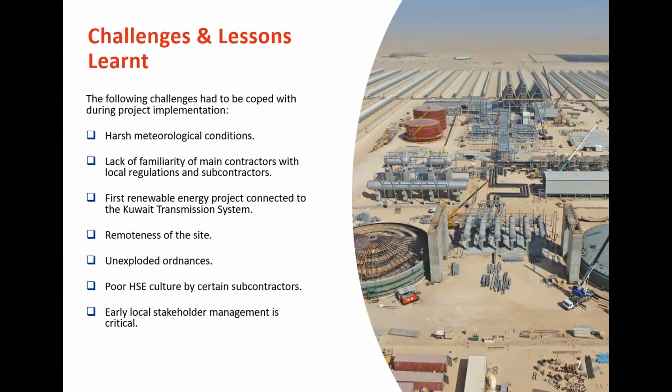Okay, so the remoteness of the site was itself a significant risk. On the other side, I've included here unexploded ordnances. Although the army scanned and surveyed the site, given the large size of the solar plants, mainly the CSP plant, a number of unexploded ordnance were found, and this obliged the DBO contractors to stop the work, causing certain delays.